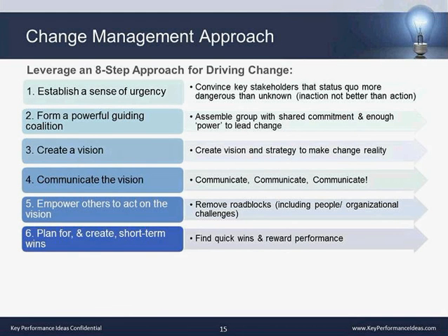Short-term wins. That is really how you build momentum. The first thing to do in any big program as you're building a strategy is come up with quick and easy things that can be done, whether it's eliminating a spreadsheet, opening up communication, adding a field to a template, building a new report, or changing your business process so a document gets sent 2 days earlier. Finding those quick wins, get people excited. It builds momentum, it builds credibility for your change, and it makes them realize you're serious, you mean business, and you can actually get the job done.